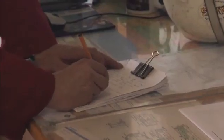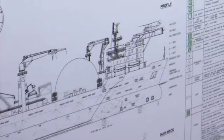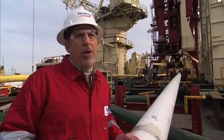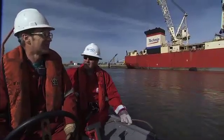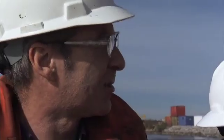So I think what needs to be understood is that the uncertainties were greater starting out, but we recognized that, and we made allowances for it, and we adapted the processes that we used to fit the circumstances. Well, there were quite a few challenges, and in fact, probably one of the biggest was the time associated with getting this project done. We were tasked with executing this project probably much quicker than any of us would have liked. So we made sure we had very experienced people. We focused on relationships with existing contractors and essentially trying to use off-the-shelf proven technologies in all cases.